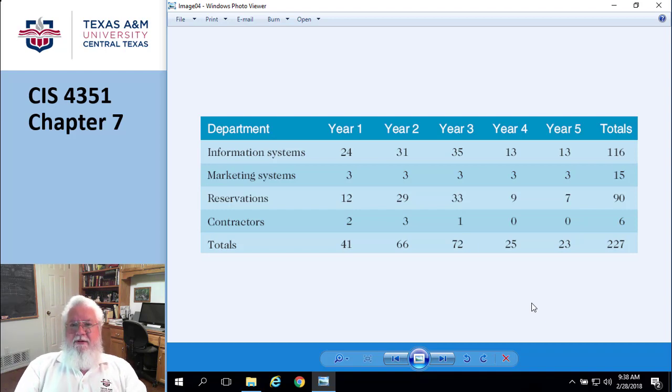And they kind of sort of don't ever forget the original estimate. So if you came in with a rough order of magnitude and you said, well, it's going to cost $1 million. And then you came back and said, well, no, it's going to cost 1.2. And then you come back a little later and say, okay, we're ready to approve the project. It's going to cost 1.4. They're going to remember that one, the 1.0. They're going to say, well, you told me 6 months ago that it was going to be $1 million. You go, well, yeah, that was just a preliminary, order of magnitude estimate. But they're going to remember that number. They're going to try to hold you to it. That's just the way it works, unfortunately.